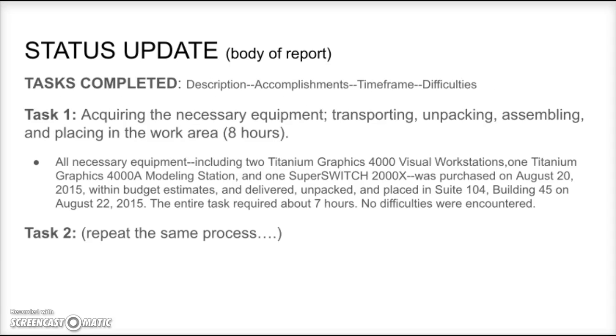Okay, so here are some examples. First, task completed. Remember, a task completed needs to be comprised of the description, accomplishments, time frame, and any difficulties. Okay, so here's an example.